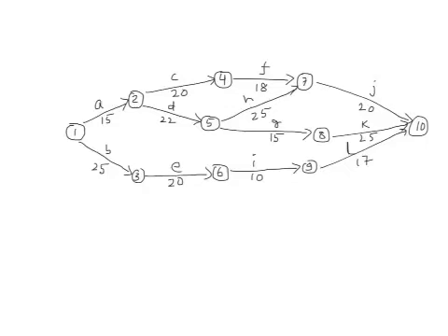Here we have drawn the activity on arrow network diagram for the given problem. Now, it's a good idea to verify from the diagram whether this is correct or not, and for that purpose the approach will be that we can check for activity A there is no immediate predecessor. Similarly, for activity B also there is no immediate predecessor. So we can check it from the table whether for A and B there is any immediate predecessor or not.